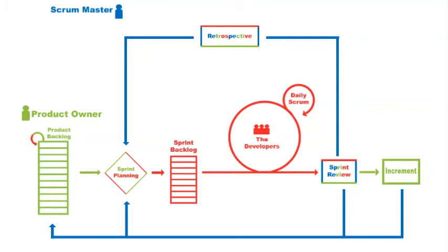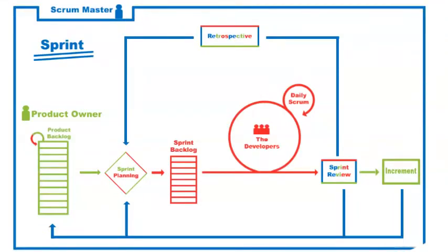The last event that we will list is a special event called the container event. This is the actual sprint itself, which has been termed a container event because all activities of Scrum occur within a sprint. In the Scrum framework, there are no activities, events, or other actions that will be carried out outside of the actual sprint. Therefore, the length of the sprint should be such that it allows you to carry out all the work to deliver a done and complete increment of the product within this time box.